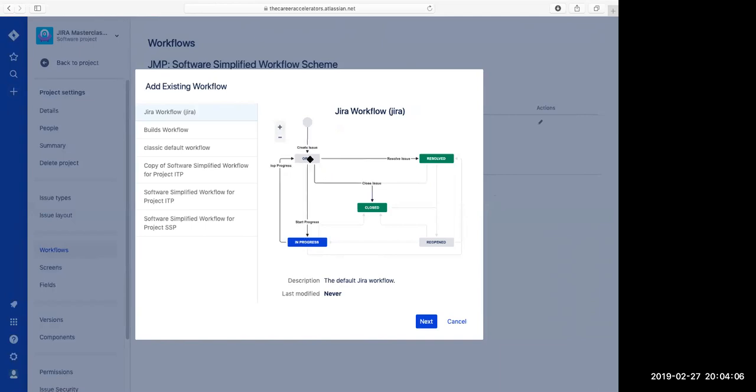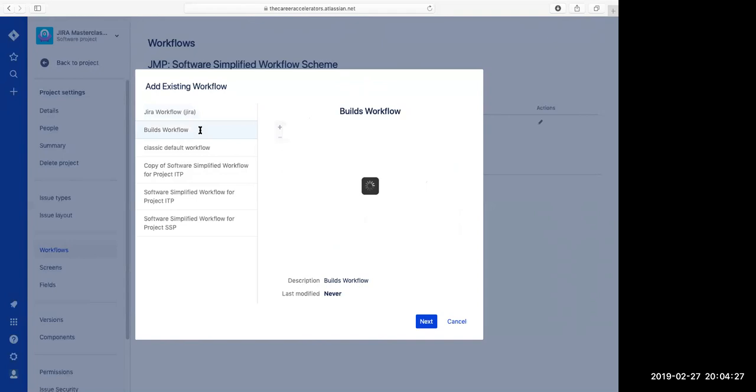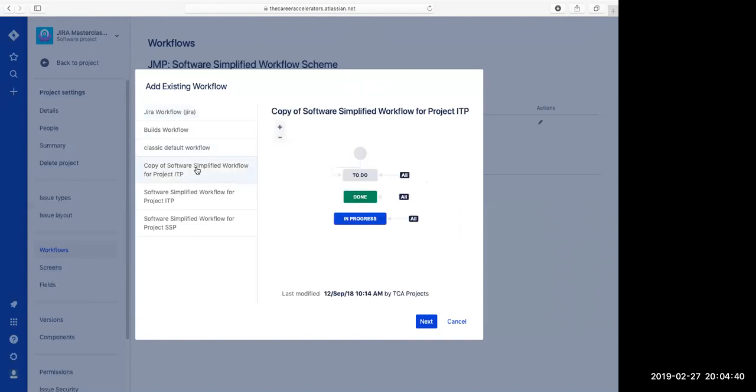So what needs to happen before the status of the issue is changed to resolve is that someone needs to resolve the issue. So that's why we have the transition in here. And again, you have other transitions. So for example, it could go from resolved to reopened, or from closed to reopened. So these are JIRA workflow examples which we can very easily choose from and apply to that project.